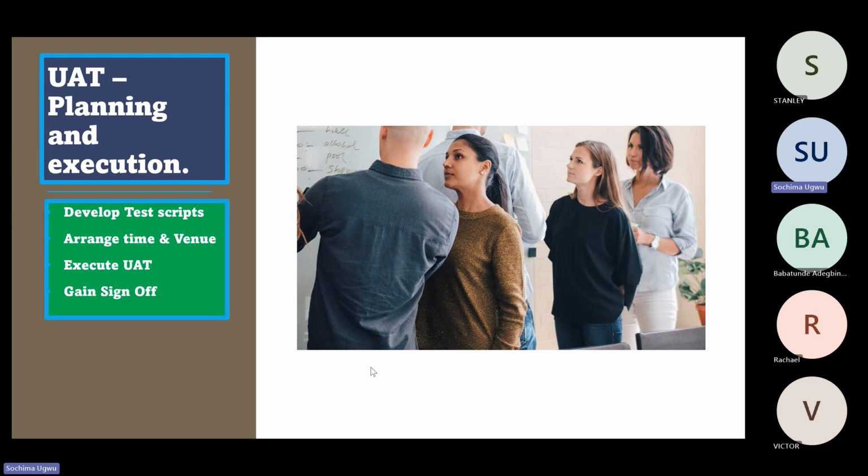But there's also something that I need to explain, because typical projects of this type tend to have more than one UAT cycle, right? So we may just have completed UAT cycle 1. Remember that we still have the other work stream. Both work streams are within the same program. So ideally, we're not going live with one without the other. So we've just been talking about one. We've just done UAT on one. So we're still going to do the UAT on the second one, and there's a very good chance we could even do a UAT cycle 3.